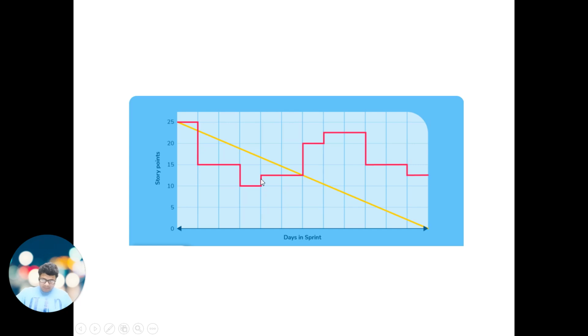But they have incurred some more user stories within the sprint. That's what it relates to. The line is moving towards the y-axis, right? Which is not good because in Scrum, once the commitment is done in a sprint and you put in more stories, then it's not good.